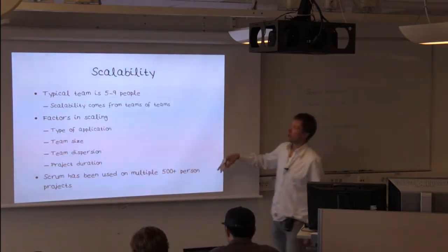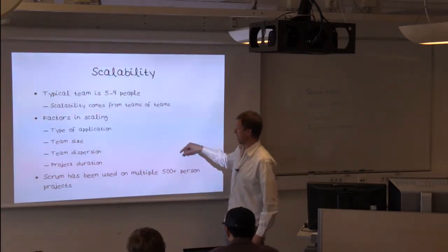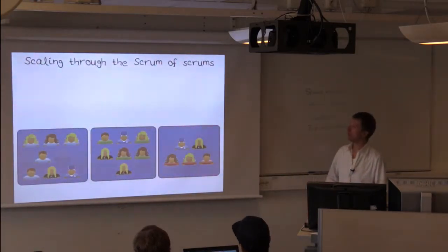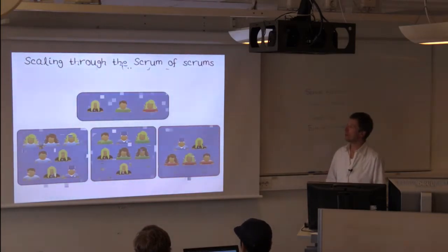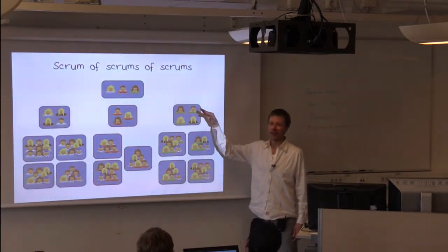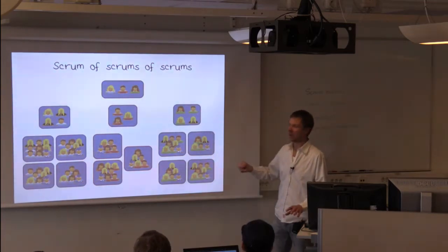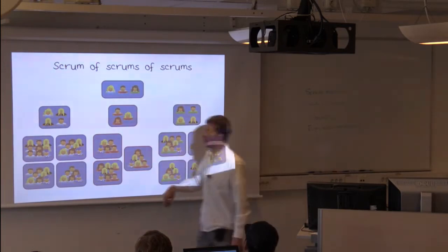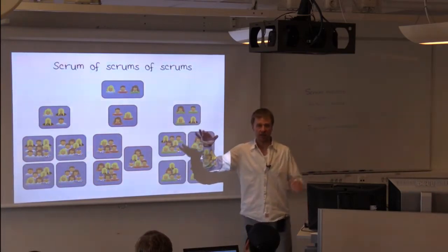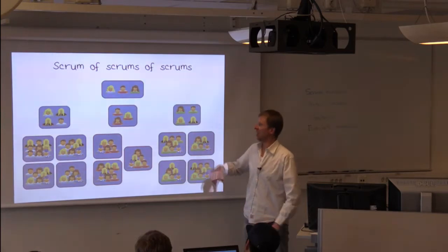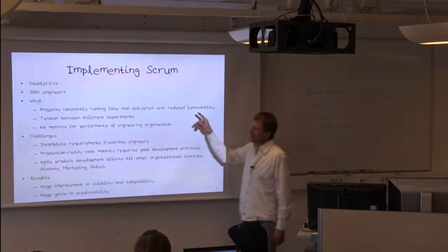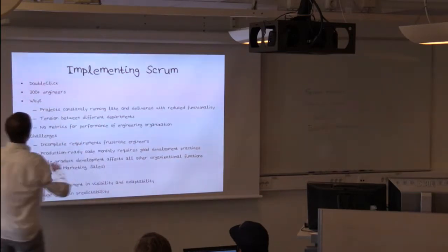Well, then what essentially you do is you are creating a scrum of scrums. And you can have any number of levels here. Obviously, you want to avoid this, right? This is just more hierarchy. But the idea here is that not everybody can talk to each other all the time. So you pick representatives from the individual teams who meet not every day, but maybe every 3 days or something to try to synchronize how the teams are working together. This is hard, though. This is very hard. So as I said, I was responsible for implementing something like this, double-click and then Google.